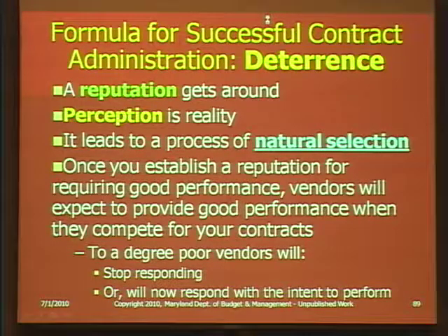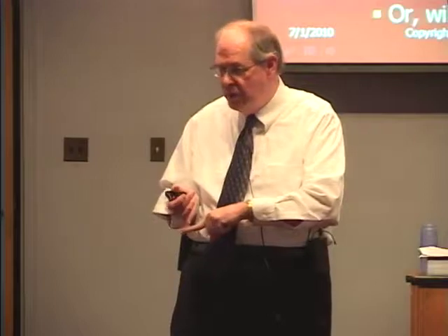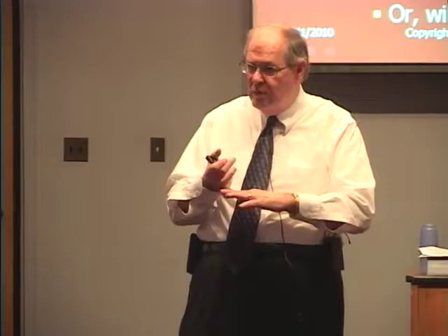So vendors that don't have those expectations of properly performing, the ones that want to do minimal work, the ones that want to get change orders all the time to get paid for other things, if they know they can't get away with it, they're either going to stop competing or they're going to change the way in which they compete. They're going to figure, I have to price to do the full job, because if I don't, I'm going to get nailed for it. So if you start with vendors that only intend to perform, it's easier to get vendors who will perform.